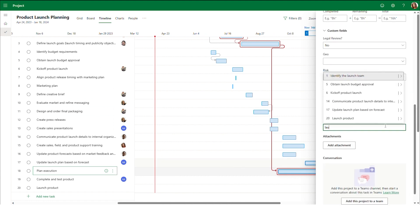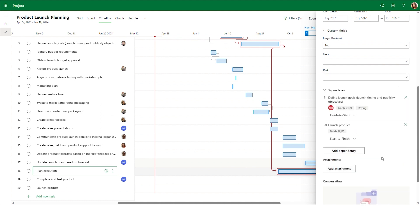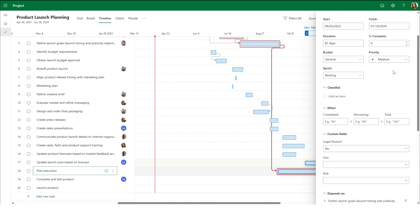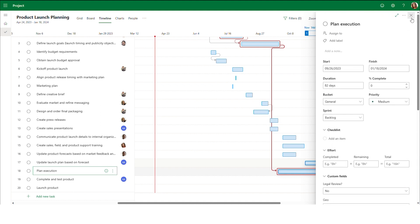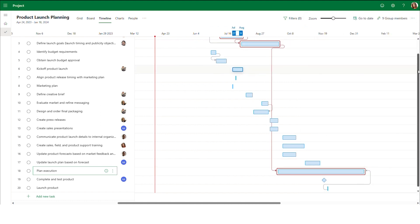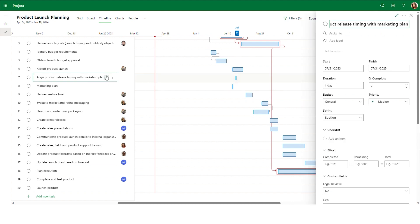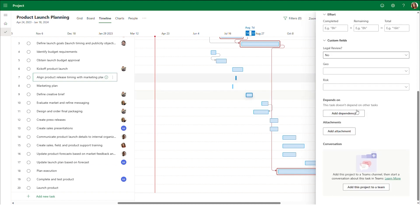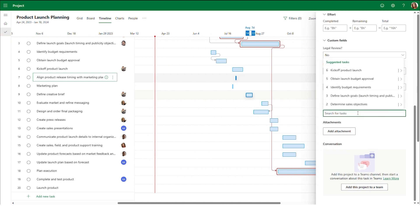The next type of dependency is start to finish. With this type, the dependent task can only finish after the task that it depends on has started. This type of dependency is perfect for creating a work back structure where the project schedule is constructed backwards for the project end date goal. For our product launch planning, we'll use a start to finish dependency to illustrate that plan execution cannot be considered complete until the task to launch the product has begun.